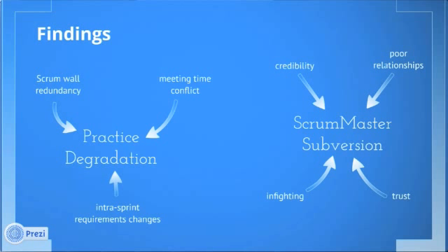And then the third thing was, the product owner is not allowed to change the requirements during the sprint. This is really, really important. But the product owner did keep changing the requirements during the sprint. So then what happens is the sprint either doesn't finish on time, or it doesn't deliver to scope, because things are changing as you go. And things always change upward. Things never get scoped down during a sprint. Things always get scoped up.